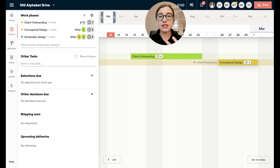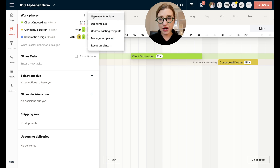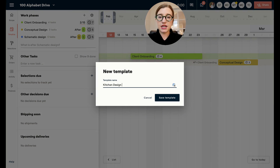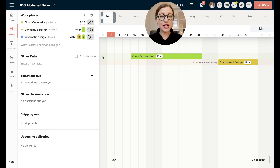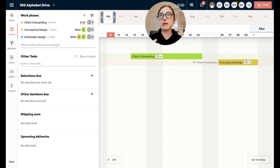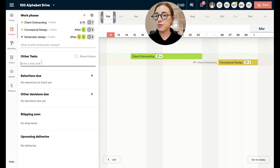That covers setting up work phases and planned tasks. Once you get a template you really like — say you're doing a lot of full home remodels or kitchens — you might want to create a reusable template. Just click the gear icon and say save new template. I might call this kitchen design template and save it. When I go to create a new project and want to use this template again, I can easily pull it in without having to reinvent the wheel.